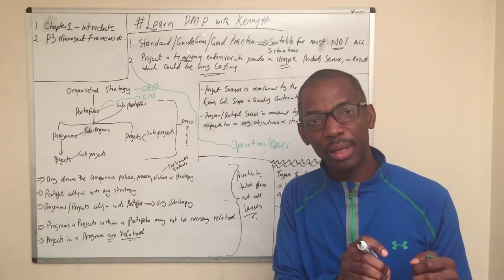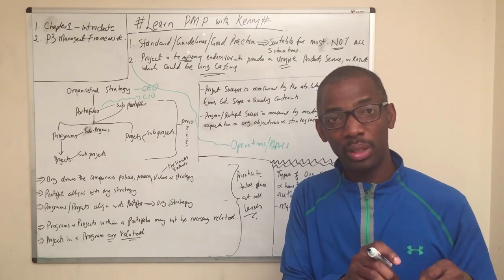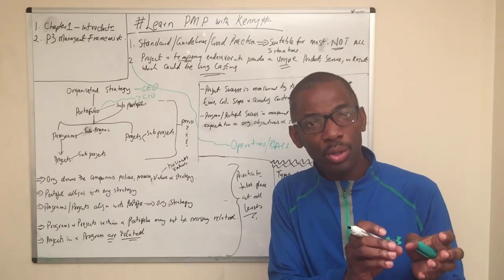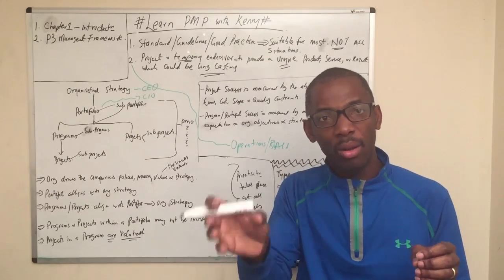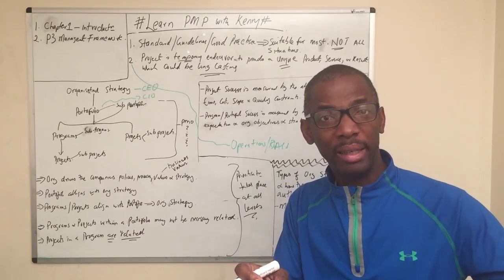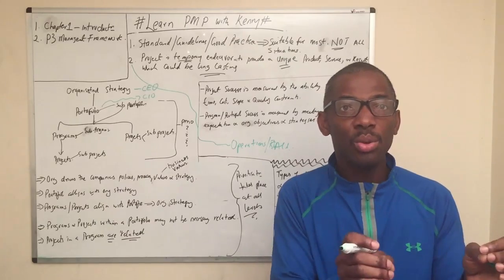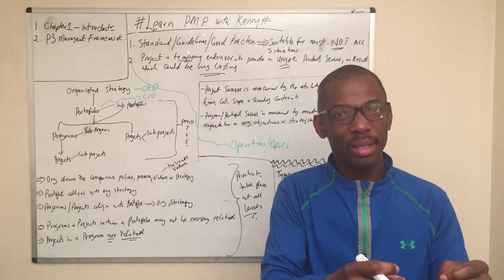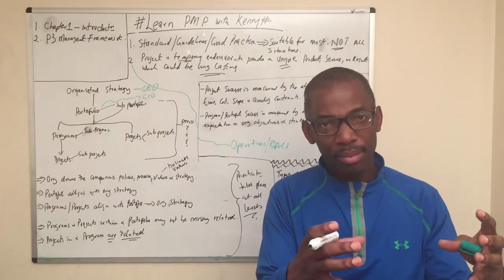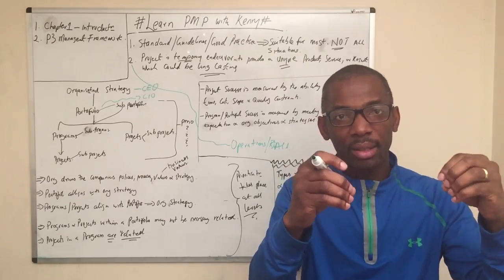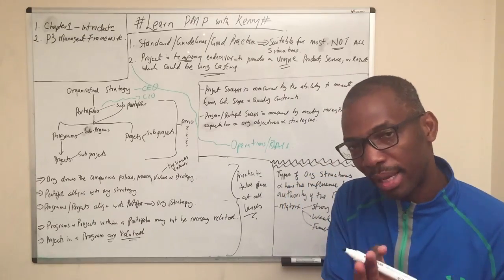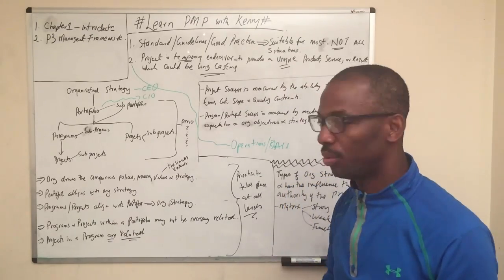So as a project manager who may be working on one or two projects as part of a program, you must be fully aware of what you're doing and what's happening outside there in other projects that might have been given to some of your other colleagues, project managers, because whatever you do may affect what they're doing. Your time scales may affect their project starting. So projects in programs are related, but projects or programs in portfolios may not necessarily be related. That's the difference I'm trying to make you realize.